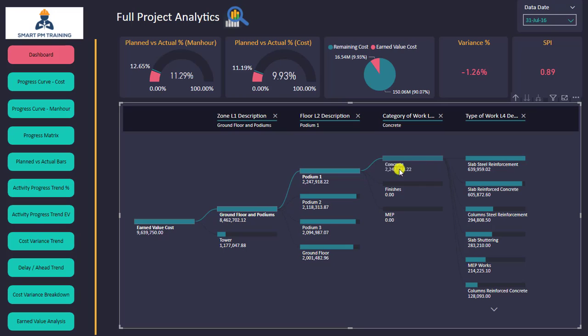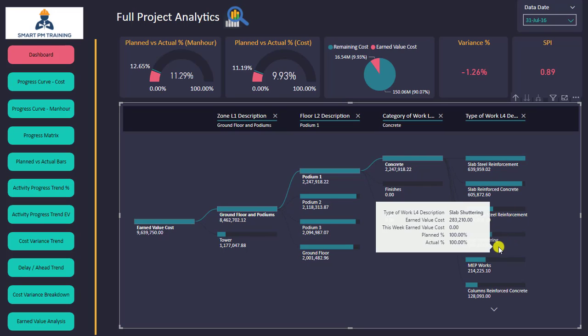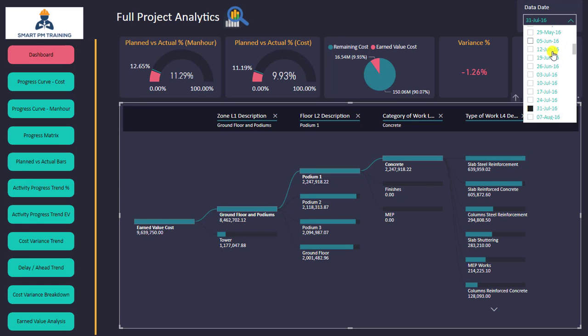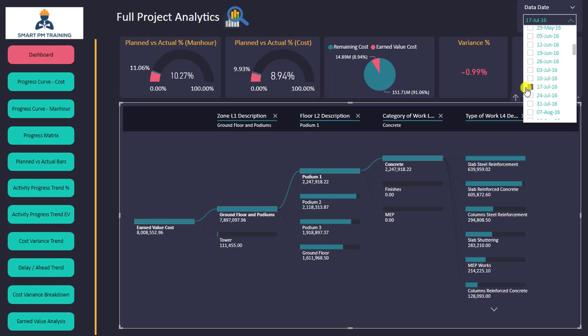I can go to more details to see the breakdown of concrete earned value: slabs, columns, rebar, shutter, etc. You can do this for any category — landscape, blockwork, plaster, paint, finishes — any type of analysis at any level of detail. And as always, I can go back to any data date and check the status, seeing the earned value breakdown at that specific point.